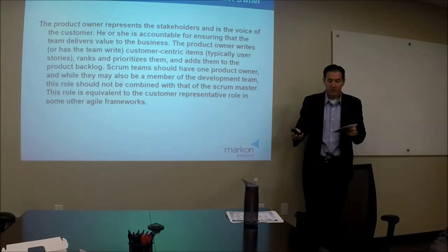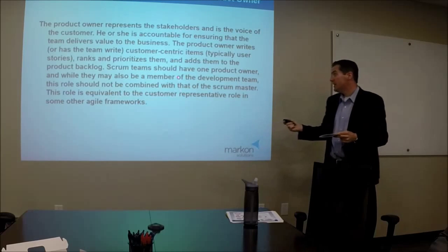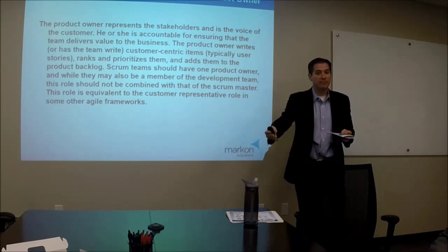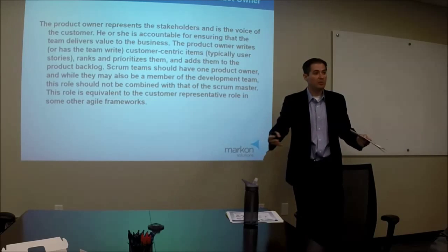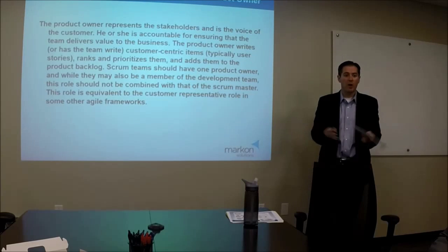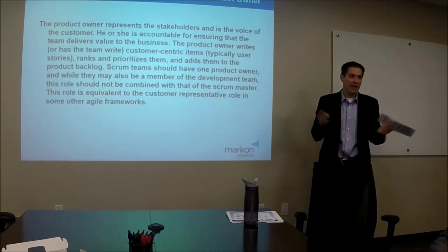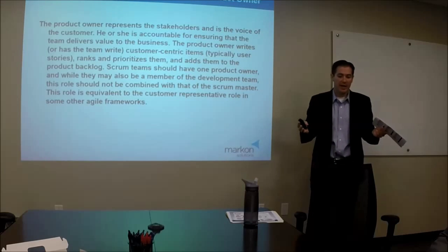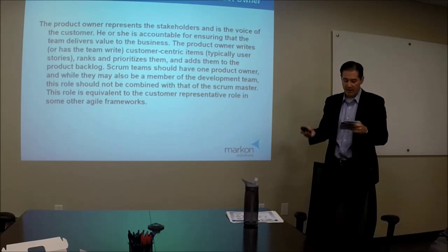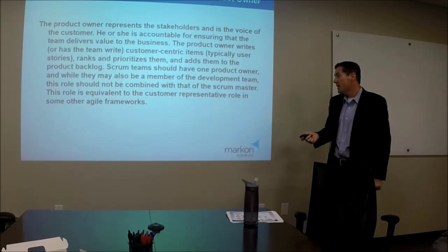Typically, Scrum teams have one product owner. You could be on multiple teams and have multiple product owners, but you really only have one product owner for that one product. So when you create the role of product owner, you're saying, this is where I get clear feedback. This is where I get a clear message on what my next steps are. This is how I know if I'm on the right path.